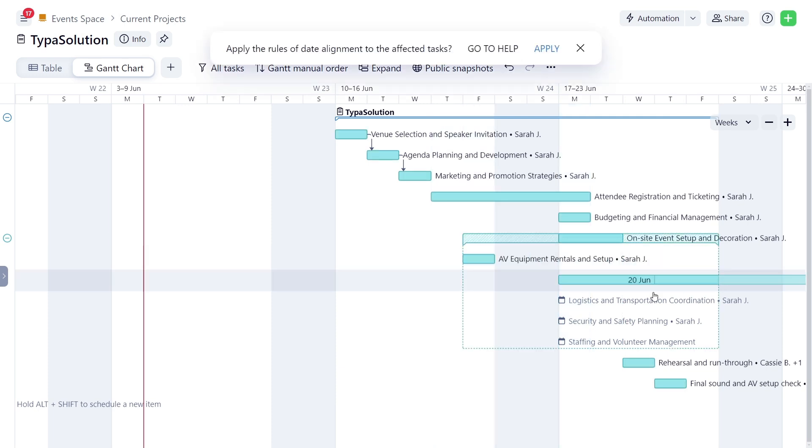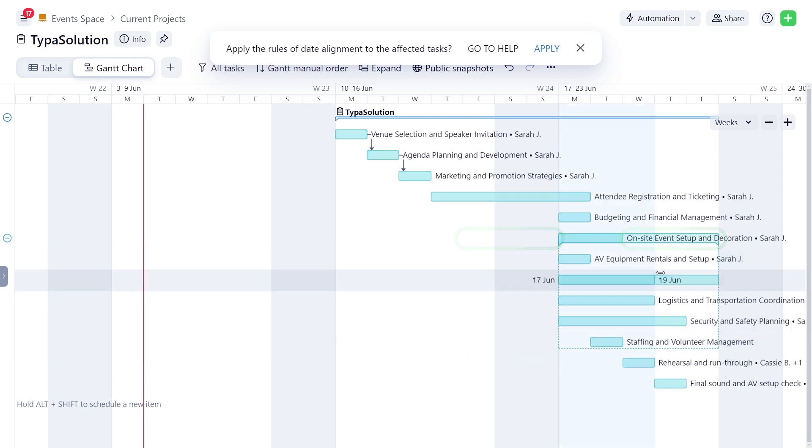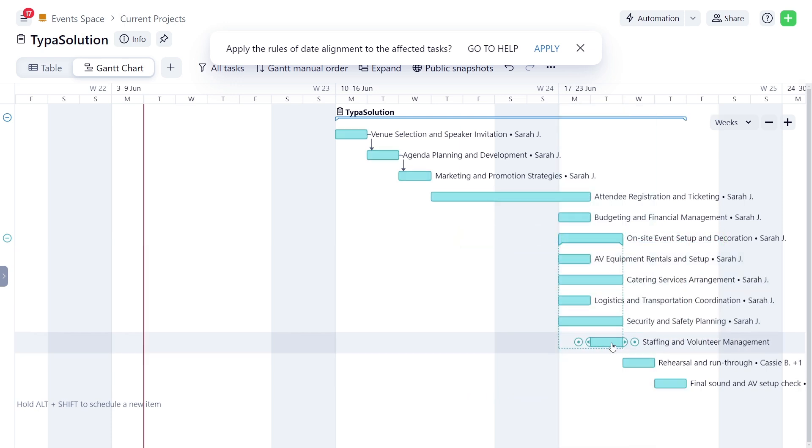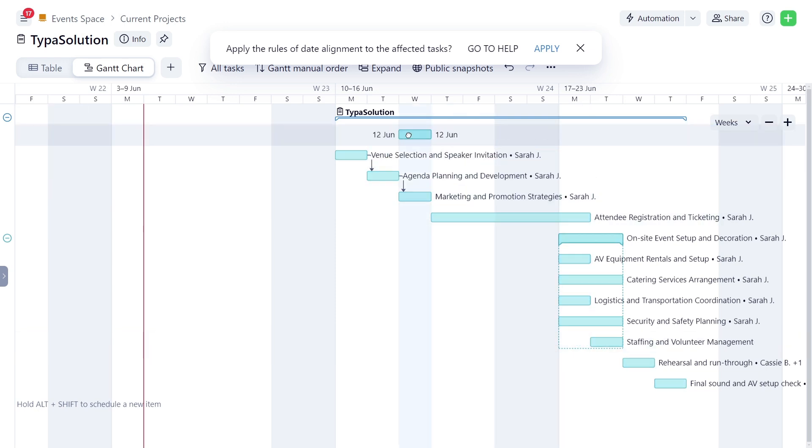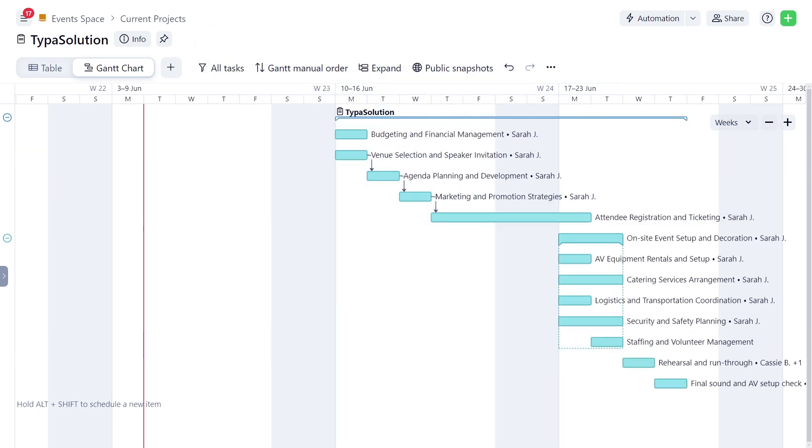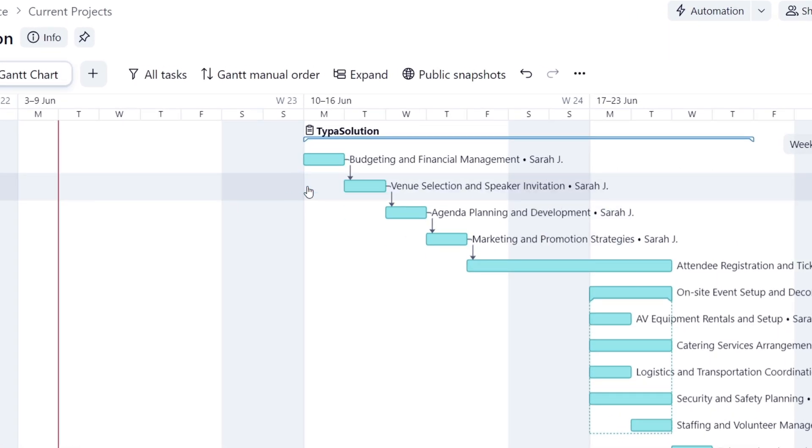If a subtask extends beyond the scheduled dates of the parent task, a transparent section will appear on the parent taskbar. Sarah also prioritizes the budgeting task by moving it up on the timeline. Then, she defines dependencies for tasks by clicking this little circle and dragging it to the beginning of the next task in the chain.